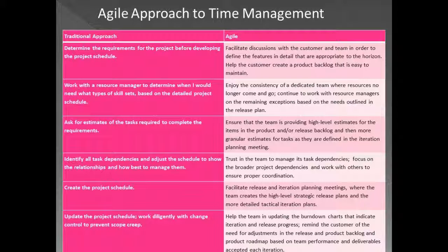And the next process was how you estimate the activity resources. Here we know that for each work package in PMBOK we determine the resources, similar to what we do in planning for an iteration. So we know clearly which team will do the iteration, and the other resources, those outside the particular iteration, are still planned at a higher level.